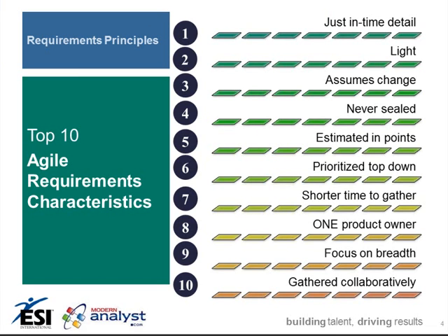Some of these harmoniously relate to the slide we looked at a moment ago, but number one, just-in-time detail. We are really looking at the characteristic of a project that's going to be built around time boxing the delivery into very tight iterative cycles. Therefore, the level of detail that's needed has to be developed just in time and has to be very light. So the level of detail will be necessarily less than probably what we're used to under a traditional requirements definition phase of a standard project.